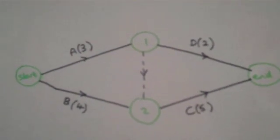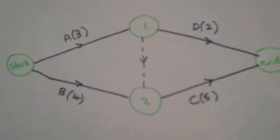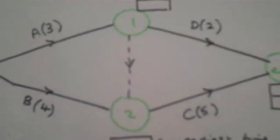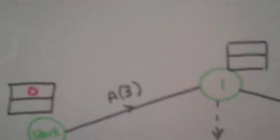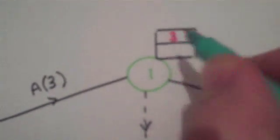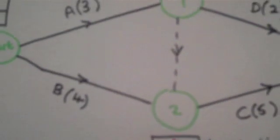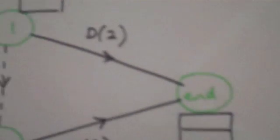Now we'll put in the hours each activity takes and use an algorithm to find the total project time. In the top box of each node, I put the earliest time I can leave that node. In the bottom box, I put the latest time. We start with a forward pass at time 0. Task A takes 3 hours, so I can't leave node 1 until time 3. Task B takes 4 hours, so I can't leave node 2 until time 4. Then 3 plus D's 2 hours is 5, and 4 plus C's 5 hours is 9. The project takes 9 hours.